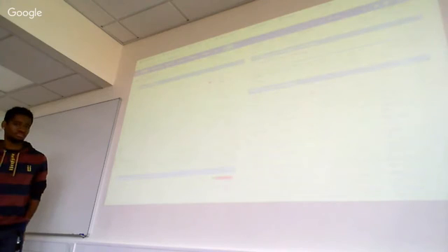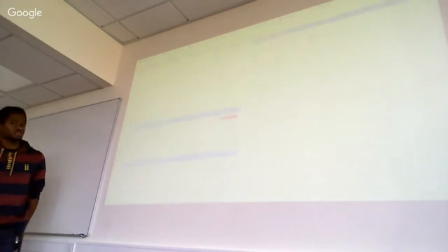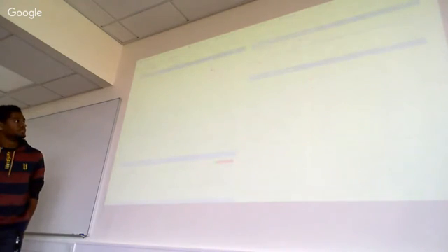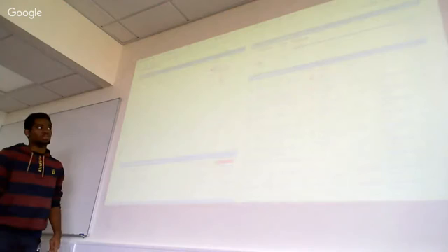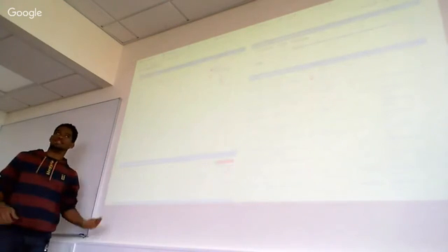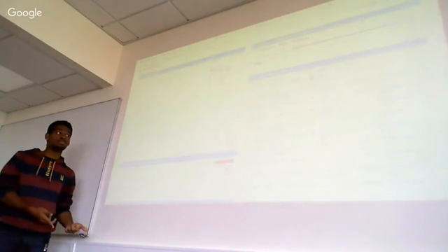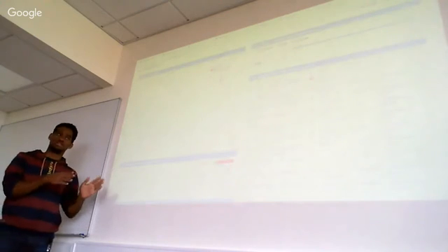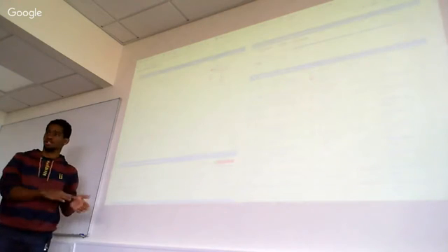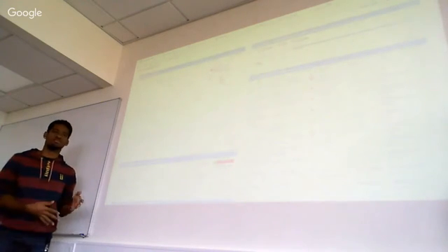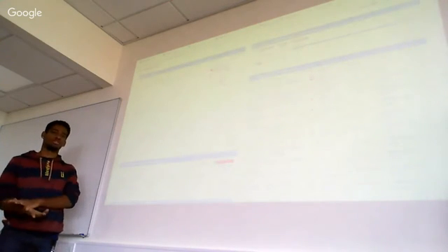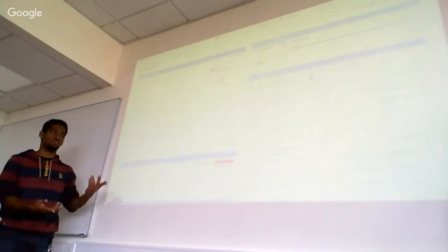Yeah, we used story points for estimates. So basically on the dashboard, what you can see is that we sometimes have story points going up again. It's because we had some issues that we closed, and then we reopened them because we didn't notice that some aspect of the feature actually didn't work, so we had to reopen the issue. So it's one of the things we have to enhance in our team, making sure that everything is perfectly working before closing the issue. So yeah, the reviewing phase, for example.